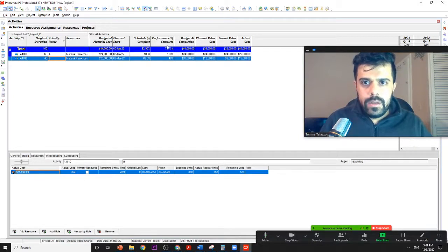You can say almost 72% of the project is done, and we have spent this much money on both of our activities. We were supposed to spend this much, so we are above budget. This is the value we have earned, but we were supposed to earn this value.